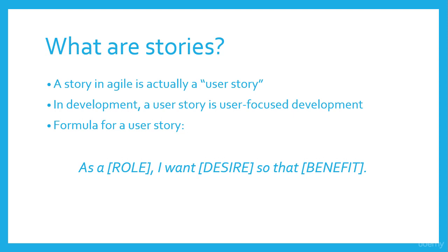So think of it like, rather than having a project of building a user forum, maybe that would be a project. Well, as a developer creating that, it's hard to know some of the things you need to know in order to connect the dots once you actually get into the details. So a user story really helps with that. So rather than having a project of something like building a user discussion forum, you can say, as a user, I want to be able to talk to other users so that I can learn from them.